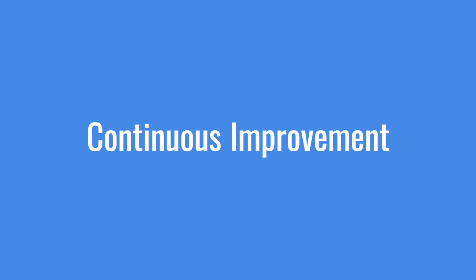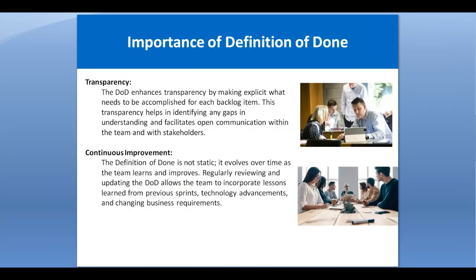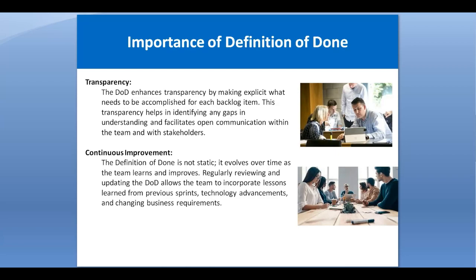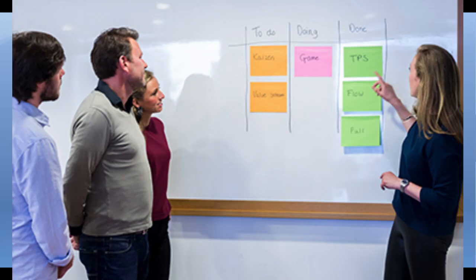Continuous improvement means the Definition of Done evolves over time as the team learns and improves. Regularly reviewing and updating the Definition of Done allows the team to incorporate lessons learned from previous sprints, technology advancements, and changing business requirements. For example, if in one sprint the Definition of Done was that a transaction should be completed within three seconds, in the second sprint that becomes an established criterion, creating a scenario of continuous improvement.